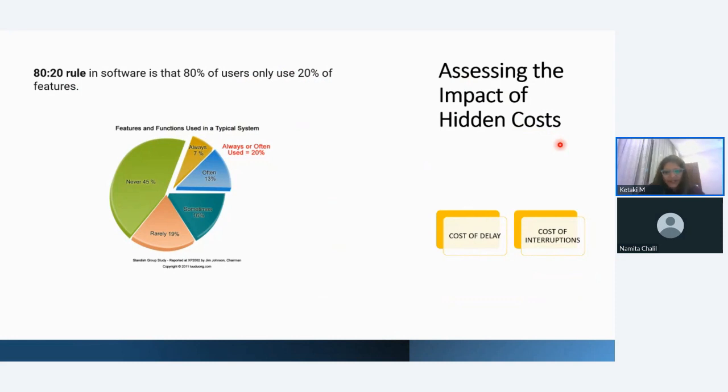The opportunity cost of delaying the work, such as foregoing a revenue, missing the market entirely, these things are identified while you are communicating the cost of delay. The cost of delay considers that implementing something now may provide significantly more value than if you wait for the next 6 months or so, right?